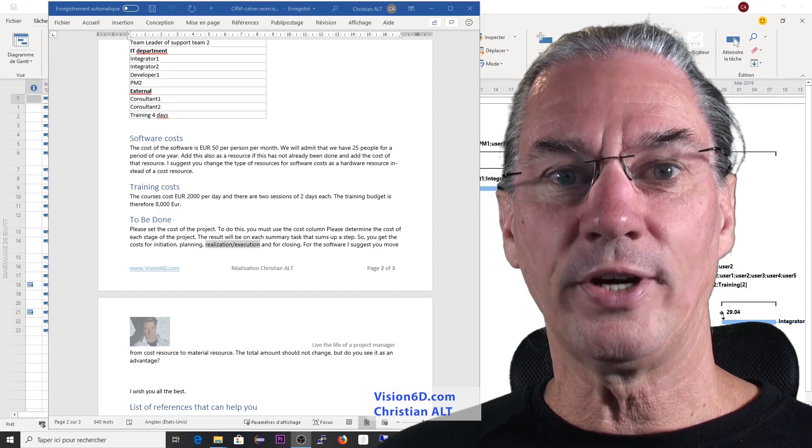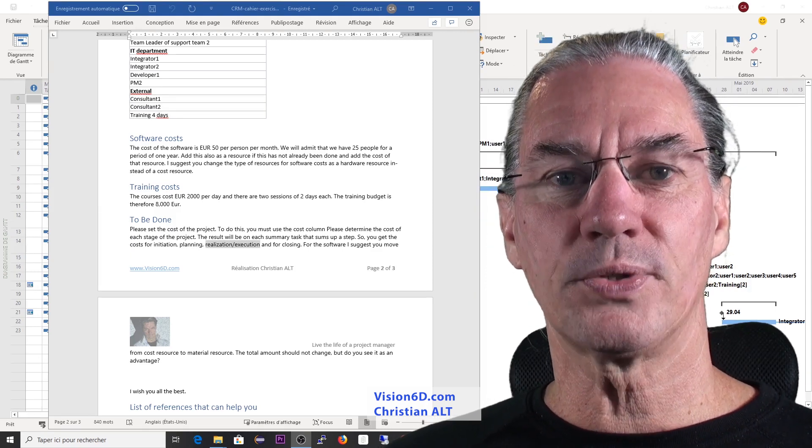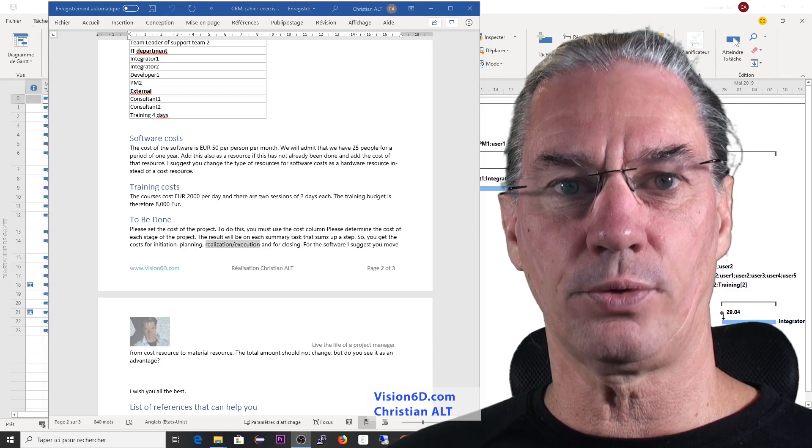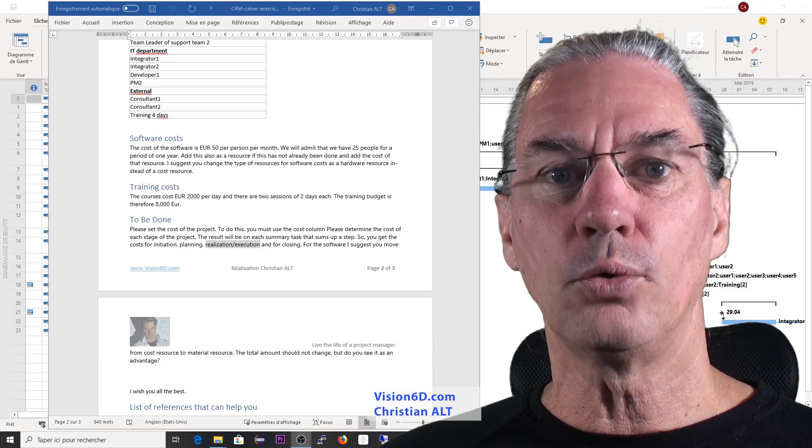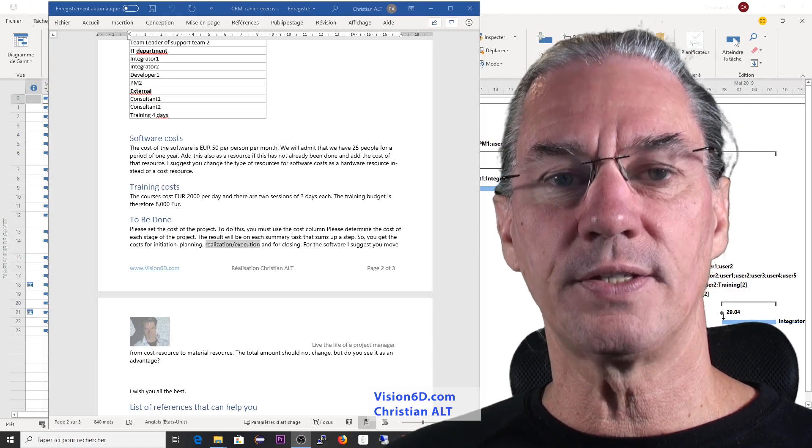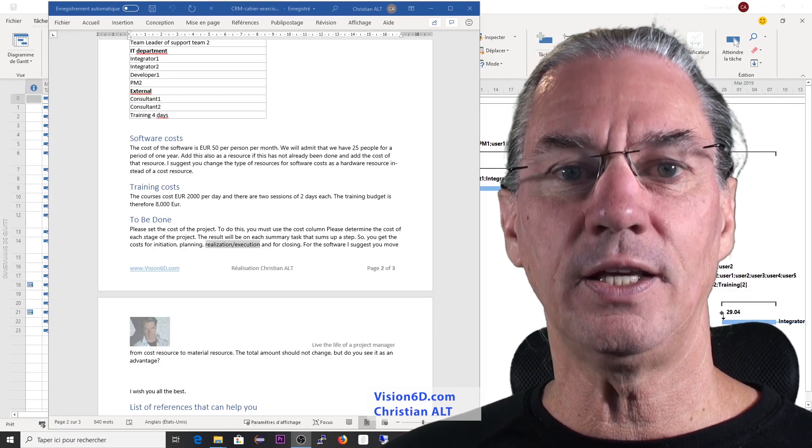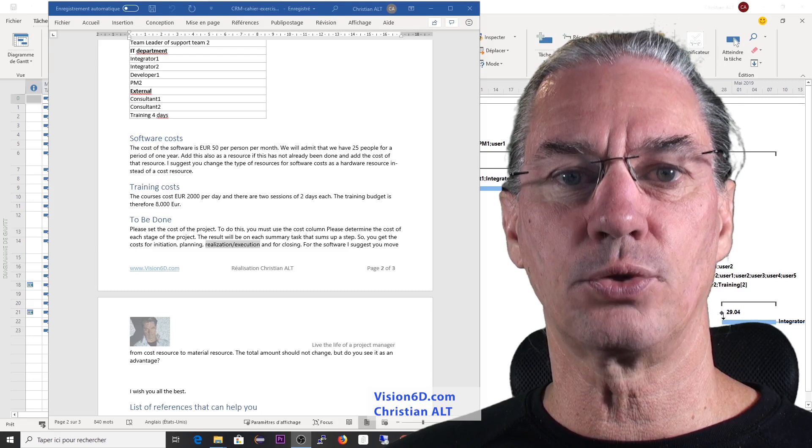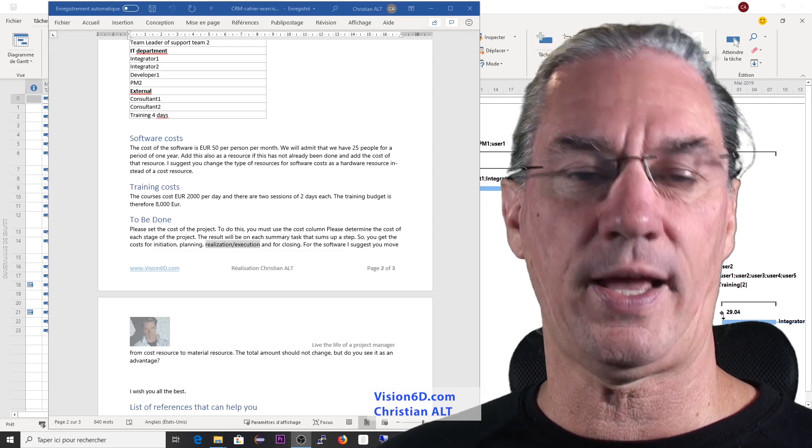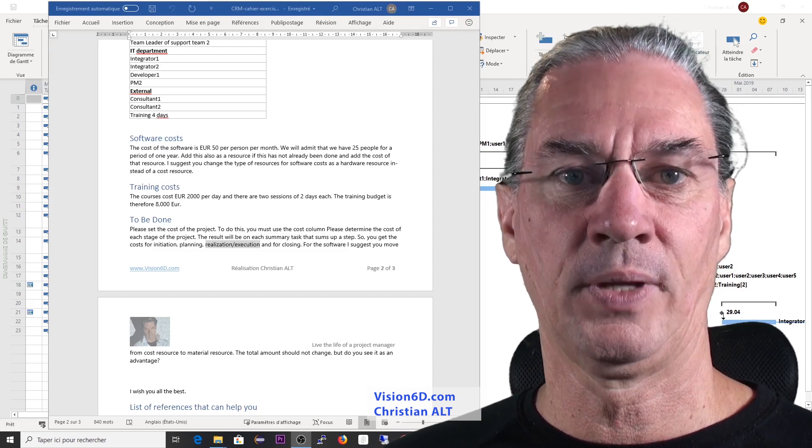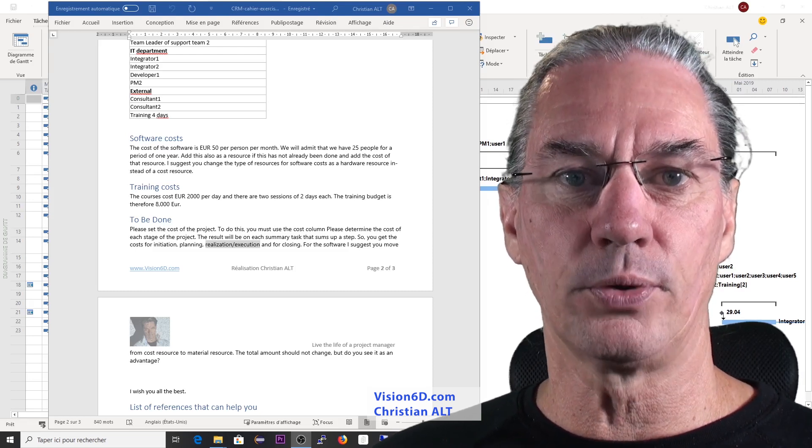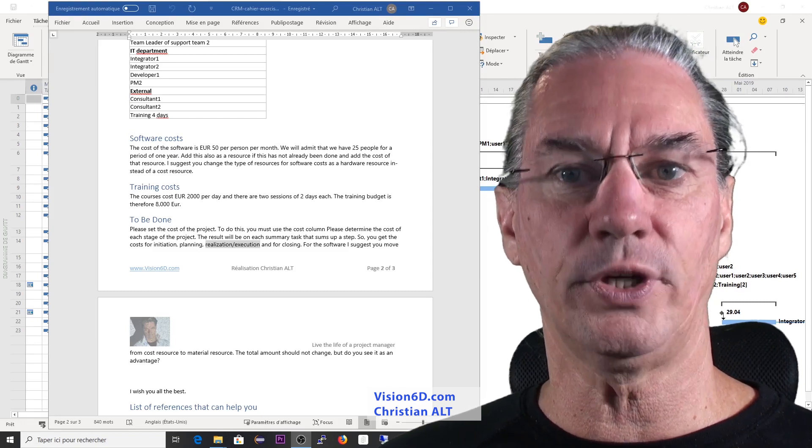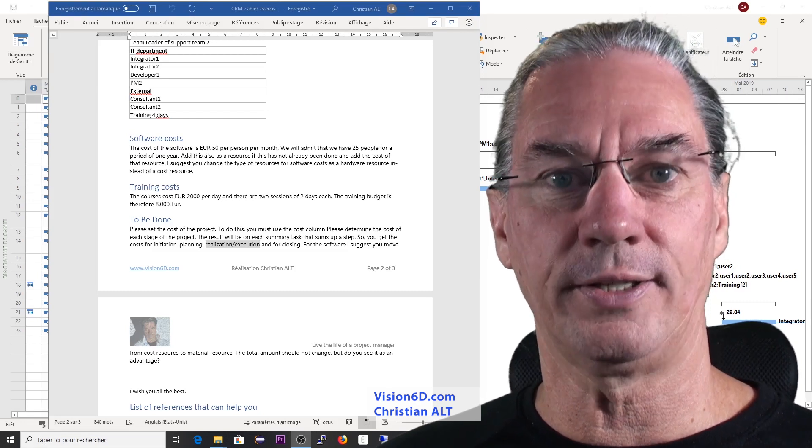For the training, I propose that you work with a cost resource. We have two days of training and each day costs 2,000, the two days, 4,000. So I propose that you have a cost of 4,000 for the training.